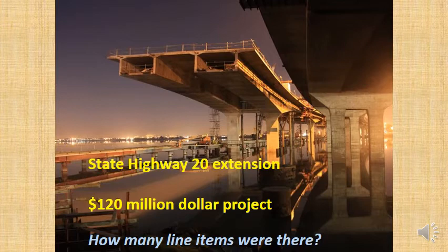But gosh, 3 million line items. They actually printed this out. They made it into files. And so when the estimate became the basis of the budget, when we were working on our work packages, we could go to the original estimate and work out how much money we should have been spending for each work package. And it was huge. It was huge.